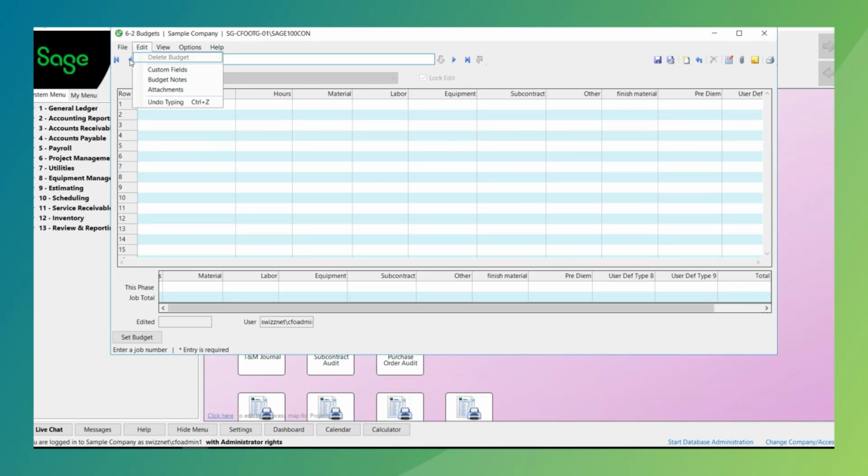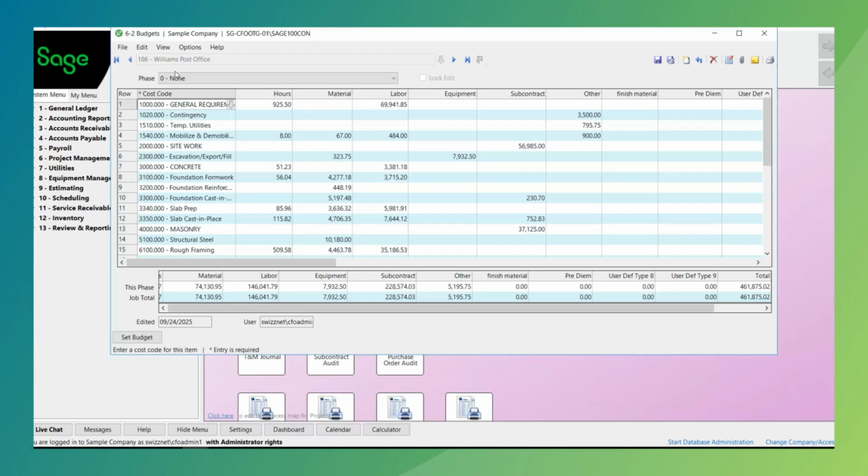So this is the foundation of our cost that comes within the system as far as our original estimate and budget. This is going to go on all the job cost reports, such as our WIP report, our job cost summary report, and our job journal reports. All of our job cost reports will have the baseline of the actual budget, so that we can start comparing cost as cost is accumulated in the system against the original budget.